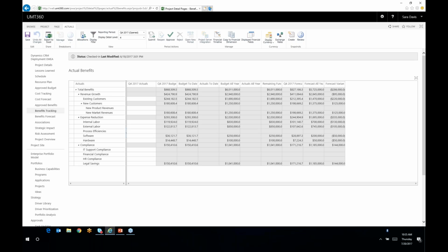What's interesting is you can track costs, let's say, on a monthly cadence through the life, but I can choose a different granularity. In this case, we've chosen to do benefit statusing on a quarterly cadence, or it could be semester, or it could be yearly. Of course, it could be monthly too. So a very similar mechanism for estimating ongoing forecasting, which is key. Reforecast benefits at each gate, and then a mechanism for tracking and keeping audit and history and archived information around benefit data too.